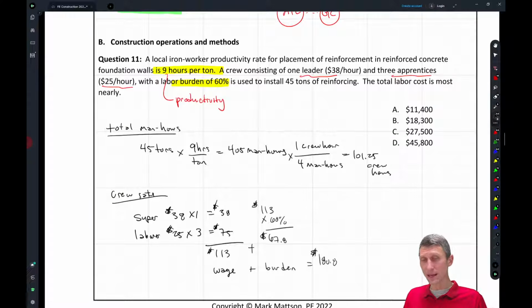Yeah, normally that gets accounted for in different places, though. It depends on how this is getting bid, but typically you have to look at both the wage, the burden, and then there's other markups that the contractor will put on, whether it's equipment rates or office rates, or there's overhead and profit. Those will get added on as well.